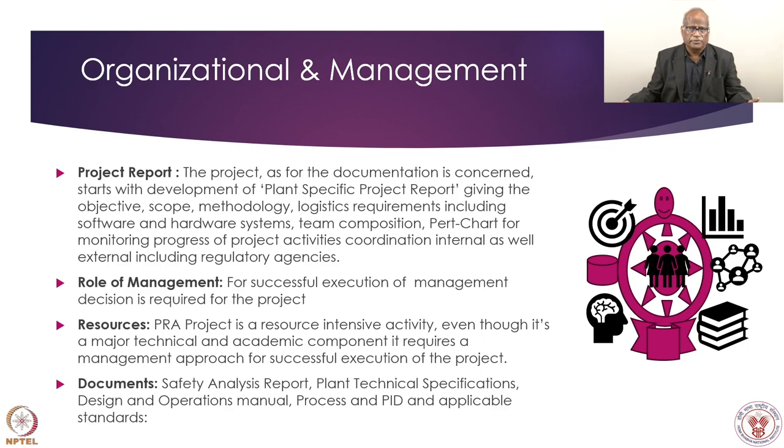and if there are reference quality standards for performing PSA and for its application, then it becomes easier. When a modular approach is adopted for the projects, for one system, one report will be there. Then at the end of that, if there is a checklist which says what activities related to that have been done and how far we have achieved them, it becomes easier for a person who was not directly involved. With just one look at the checklist he can tell, yes, they have met all the attributes of the PRA, or they have not met one or two. So it opens a scope for focusing where the review should be done, or we accept it as it is, instead of somebody at the other end, in peer review, trying to understand what all has been done.